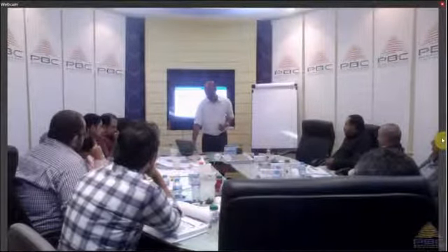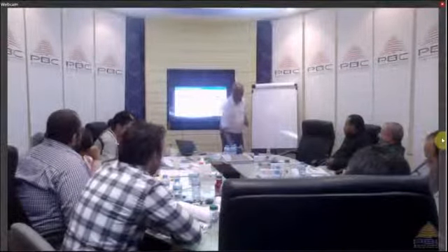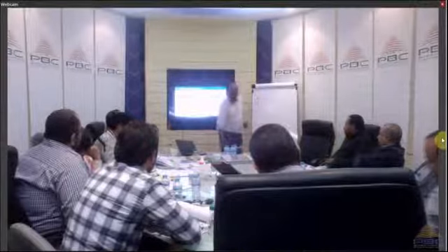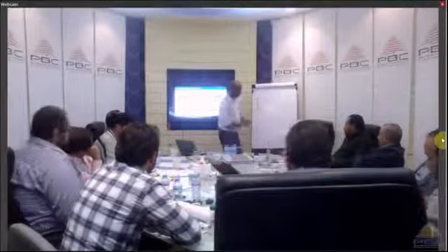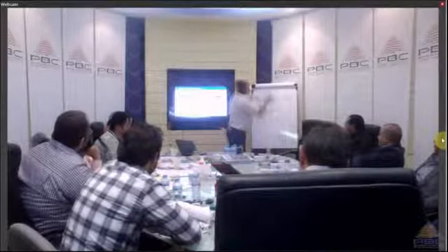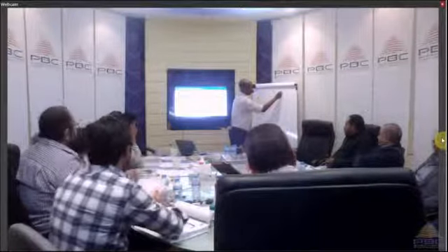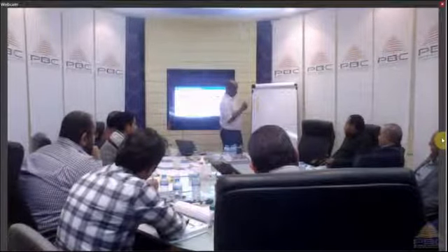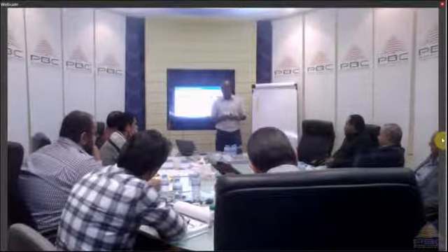So, estimate activity resources. We come up with the activity resource requirements needed. Now, how does that look? It looks like this. You have the activities here with the duration, whether they are excavation, painting, filing, whatever. Then you have your 4 columns: your HR, your equipment, your material, and others. For each activity, you specify the type of resources and the number of resources you need.